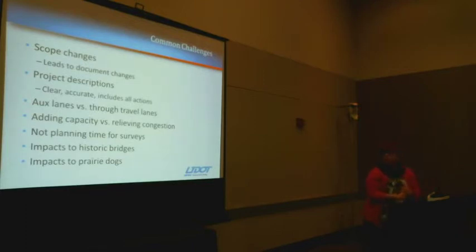And then prairie dogs in southern Utah, we all know they like to burrow in our right-of-way, and we have a biological opinion with Fish and Wildlife as to how to deal with prairie dogs, but it's something you have to consider, and it could add extra time to your project, either in completing the CE or limitations on construction or pre-construction surveys that have to happen before your project actually begins construction.